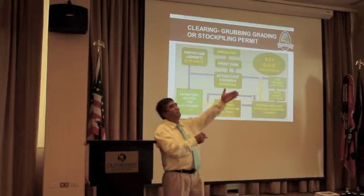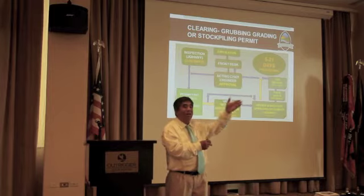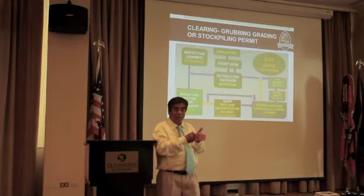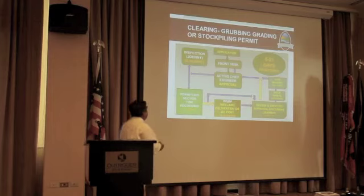because once it's done, these guys get away, and then they will come and claim, hey, I have submitted all of this. And the secretary said, no, you did not submit that. So make sure that each one of the submittals is correctly listed in your transmittal. Okay, that's the front end.